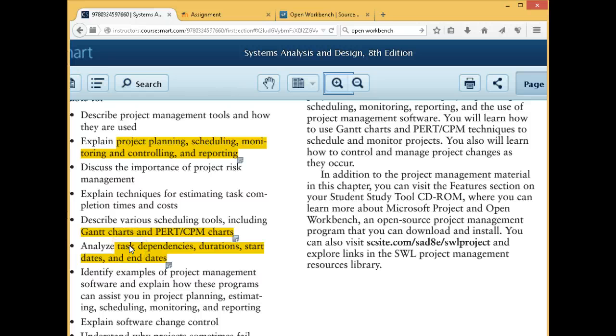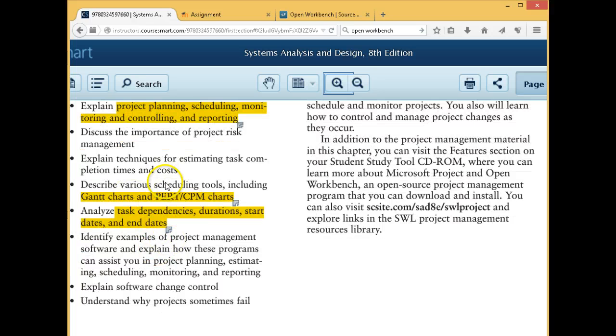Like you can't put the gadgets together until you have all your parts. So assembly is dependent on delivery and ordering of all the parts. Some fairly basic concepts there, but making sure that that is handled in your project schedule. And the cool thing about this project scheduling software is you can manage multiple parallel tasks and assign expected work from your resource people.